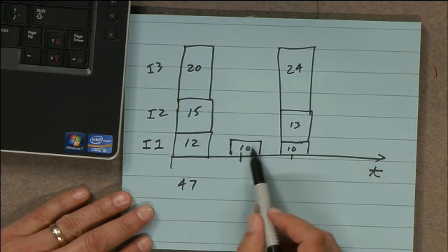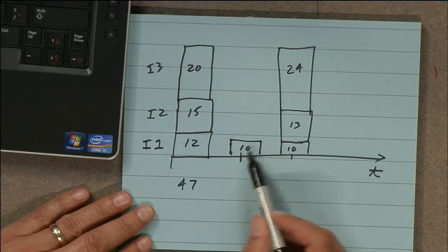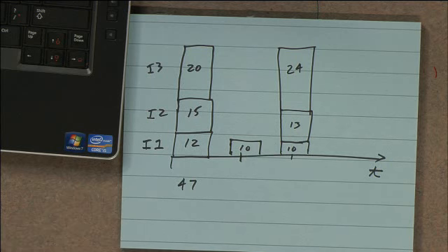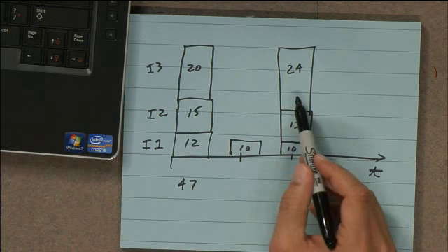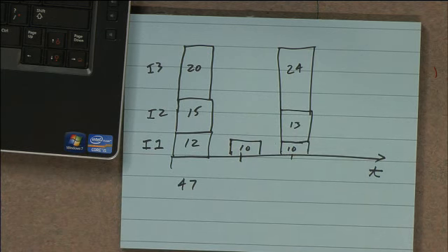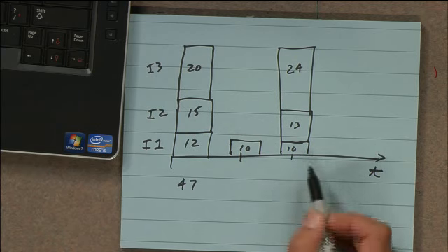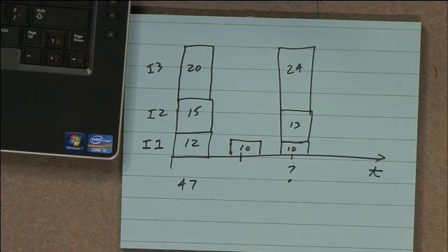This is telling me that I'm falling behind, right? And you can start raising some warning bells because, what's the probability, and you hear this a lot from the development team, that in increment 3 you're suddenly going to catch up since you've been behind for 2 increments? So it gives you some advanced warning that, hey, I may have some problems out here. I may have to either have another increment or do something else to catch up, but you can track these things over time. It's an interesting metric to collect, okay?